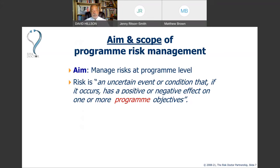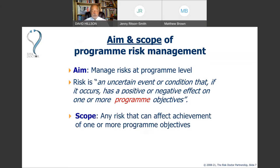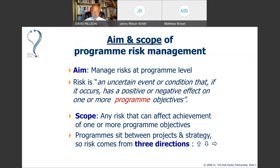The aim of programme risk management is to manage any uncertainty that, if it occurred, would affect programme objectives — which is immediately different from project risk management, which focuses on project objectives. In scope is any risk that can affect achievement of one or more programme objectives. Because programmes sit in the middle between projects and strategy, the scope of programme risk management has a number of different directions to consider.